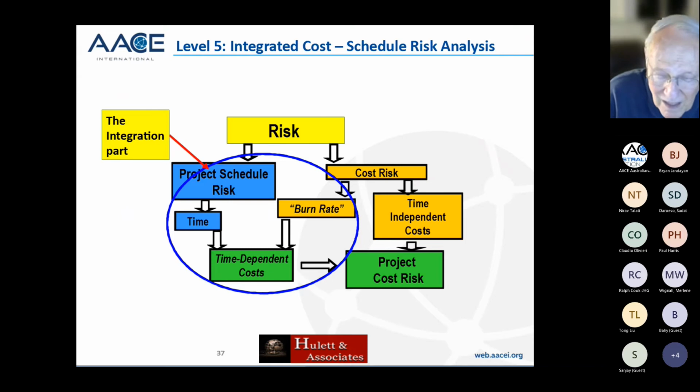like raw materials like steel and concrete and equipment to be installed, and then there's time-dependent costs. Those are the labor costs, the overhead costs, the cost of equipment, like how long do you have the scaffolding up? If it's an extra 6 months, it's going to cost you an extra 6 months. Or how long do the drill rigs help? If it takes them 35 days instead of 25 days to drill a hole in the ocean floor, they're going to charge you for that.